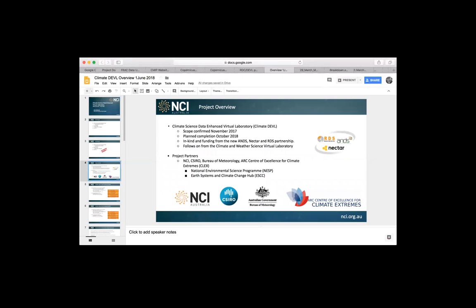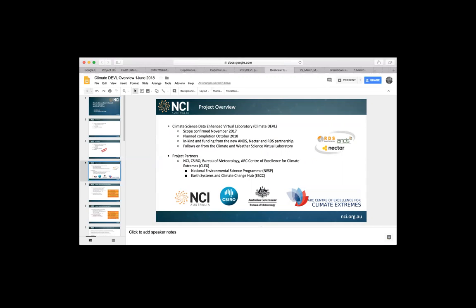As Robert also mentioned, we're one of the projects funded through the RDS and NECTA Climate Devil Program. We got our scope of the project confirmed in November, and we're aiming for completion in October. As a project manager, I like to leave a little bit of leeway because of the inevitable delays that will occur in terms of both completing some of the technical things as well as getting that documentation up and complete. The work that we're doing builds on from the Climate and Weather Science Virtual Laboratory, which was a NECTA funded project several years ago, and I was involved in that project when I worked at the Bureau of Meteorology. So I'm very excited to be doing this next stage of work.